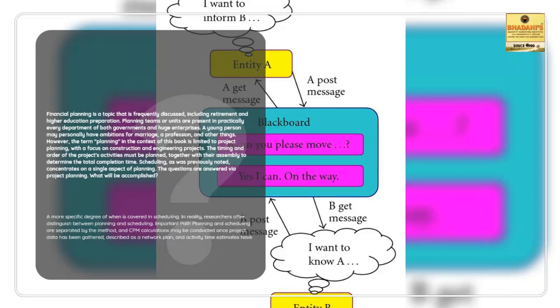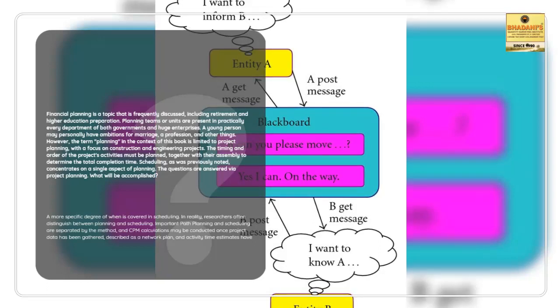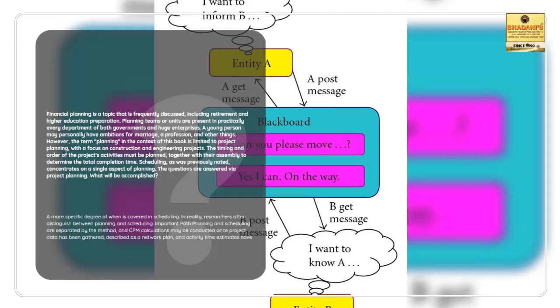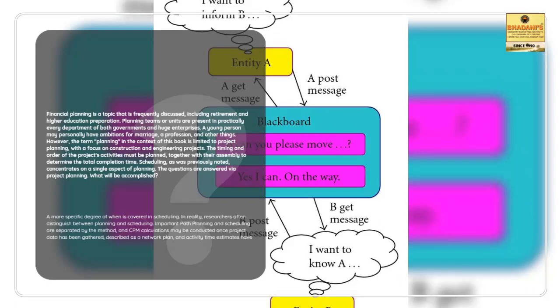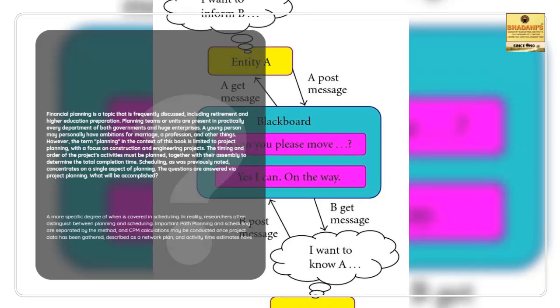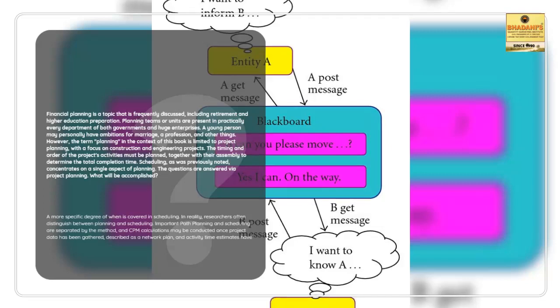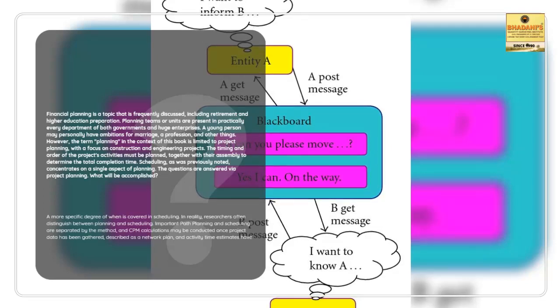Critical path planning and scheduling are separated by the method, and CPM calculations may be conducted once project data has been gathered, described as a network plan, and activity time estimates have been allocated. When the first calculation that yields a project duration is done, planning ends and scheduling begins. The scheduling process then starts after comparing the project length to the intended timeline.